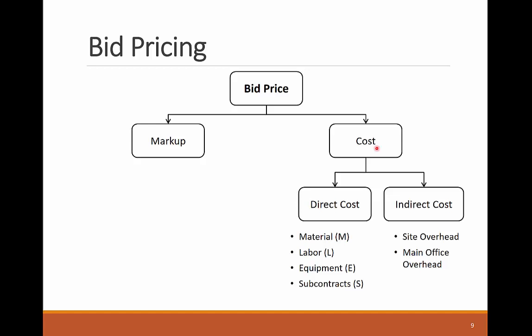Cost refers to the actual expense that the contractor pays to finish the work, and it includes direct and indirect cost. Direct cost is any expense you can directly associate to a single activity or work package, including material, labor, equipment, and subcontractors. For example, the material cost of structural concrete can be the ready-mix concrete you pour; its labor cost includes the crew that places the concrete; its equipment cost includes the concrete pump; and the subcontractor cost can include the rebar and formwork done by a specialty contractor.